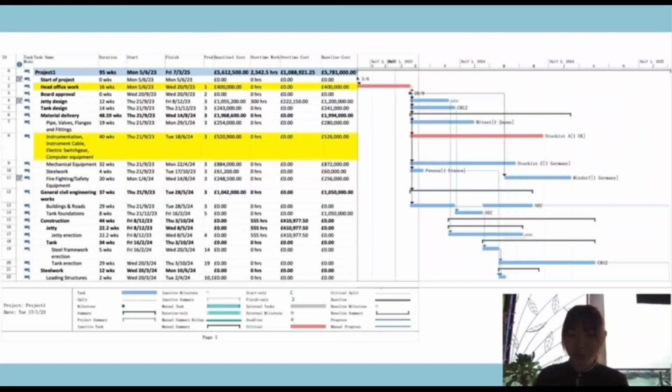After receiving the project brief, the project initiation process starts. At this stage, it was necessary to obtain vendor information, costing, and a precise estimate of the overall project duration. The vendor selection method was agreed based on the country of origin, price, delivery schedule, and rating of the vendor by previous clients, classified into 4 parts: 1 poor, 2 moderate, 3 good, and 4 very good.